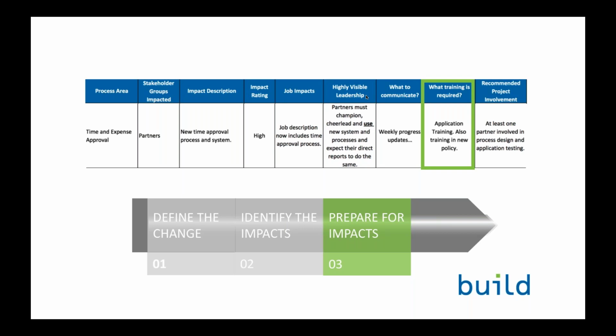We know that the partners are going to require training on the application, as well as training and education on the new policy that's going to be in place. And then finally, because they're a highly impacted stakeholder, we want to make sure that at least one partner is involved in the process design and testing the system, to make sure that we've implemented that functionality properly and that their voice is heard.